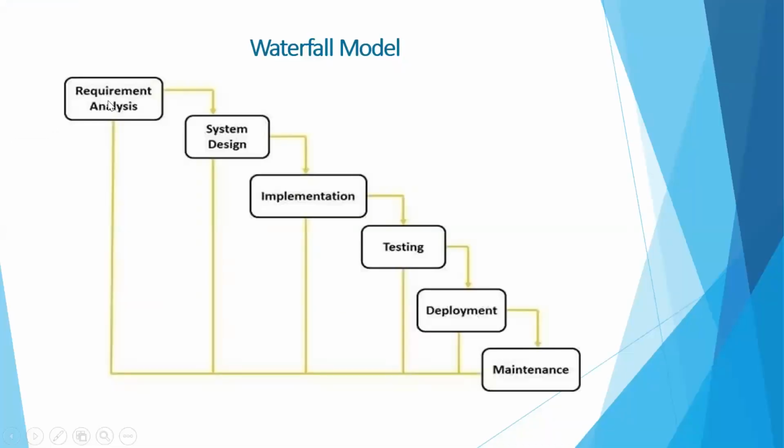He is responsible. The business analyst will go to the stakeholder or client. He will have some initial meetings and get all the requirements, understand them at a high level, create the documentation, and give it back to the client. Again, the client will review it, and once it is accepted, it will go to the next phase. So this requirement analysis is done by the business analyst.